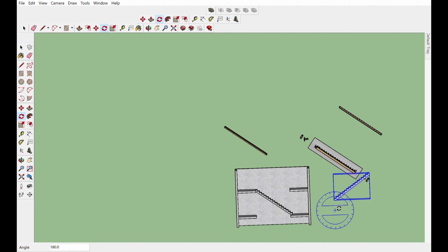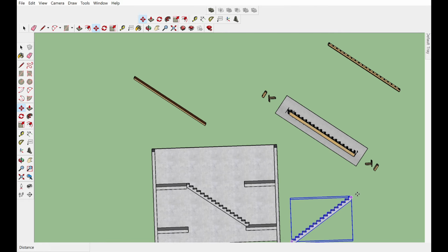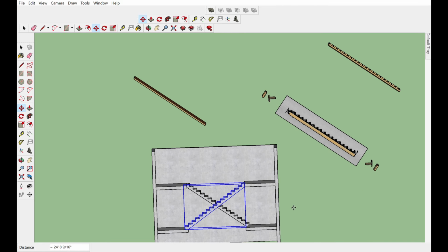Production and staging. Using this approach, stairs can be poured on a repeat cycle, such as every 2 days, allowing multiple stair units to be produced and ready ahead of installation.